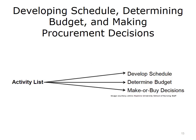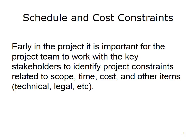The project team uses the activity lists generated from each work package to create the project schedule, determine the project budget, and make procurement or outsourcing decisions for the project. Project constraints must be identified and managed by the project team because of their impact on the performance of the project. Projects have constraints related to scope, time, cost, and other items such as technical and legal issues. Early in the project, it is important for the team to work with key stakeholders and ask questions about constraints so they can plan the project schedule, budget, and procurement activities.